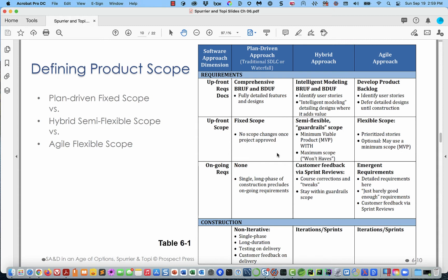So typically what they do is if somebody wants to propose a change to scope, they write up a little proposal. The team and the stakeholders review the proposal and they ask themselves, is it worth it for us to collect the details on this and further evaluate it?